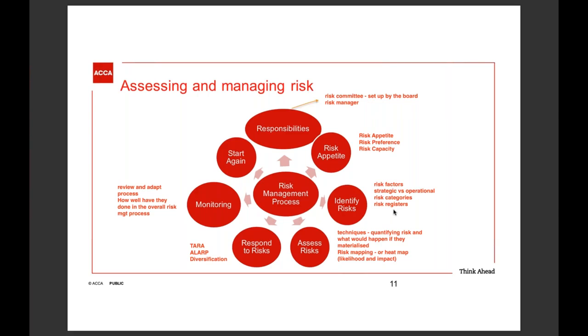You have identified those particular risks, you have categorized them, once you have already assessed them, so you might have to put inside the likelihood and the impact inside your risk register pertaining to the risk that you have already identified just now. And then the next thing that you may look into is how you'll be responding to those risks if the risk were to materialize. And another thing that you may want to have inside there as well will be who will be responsible for that particular risk.